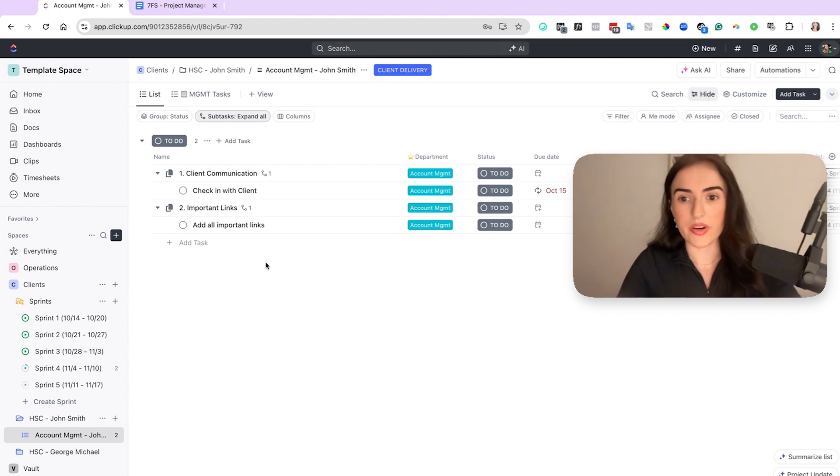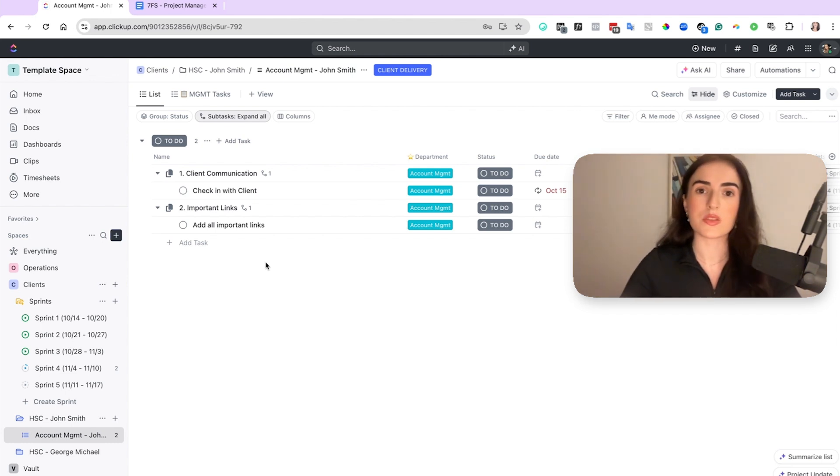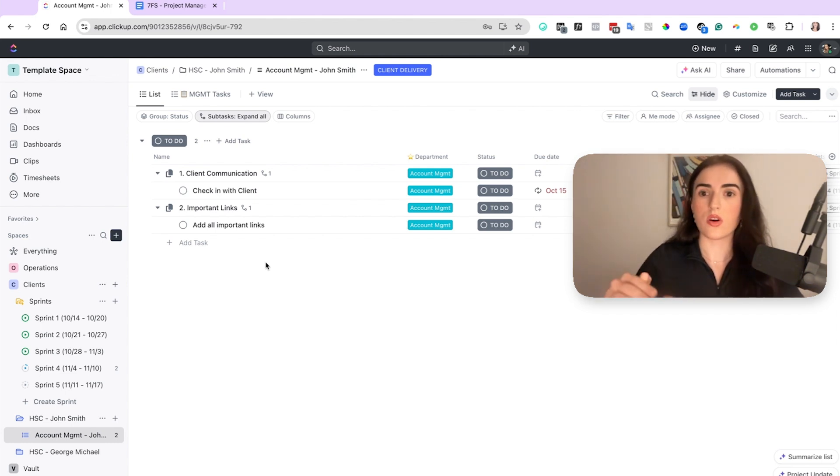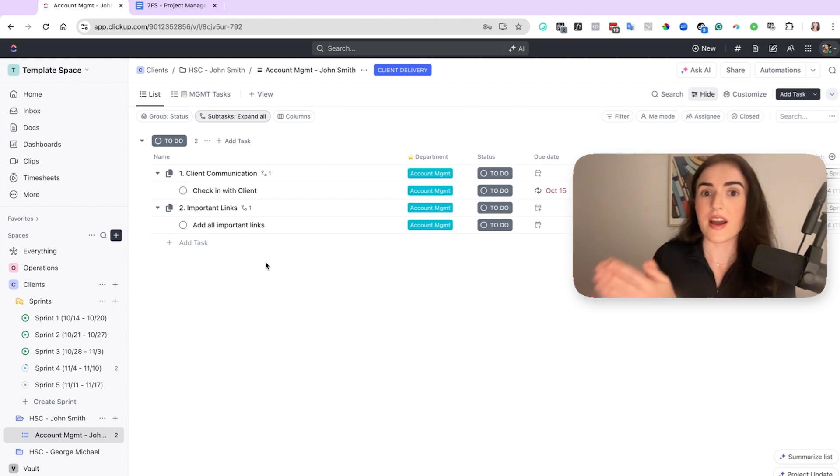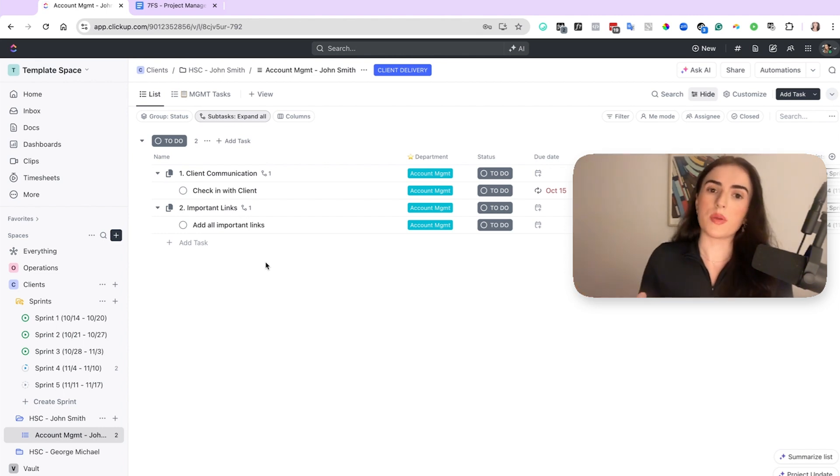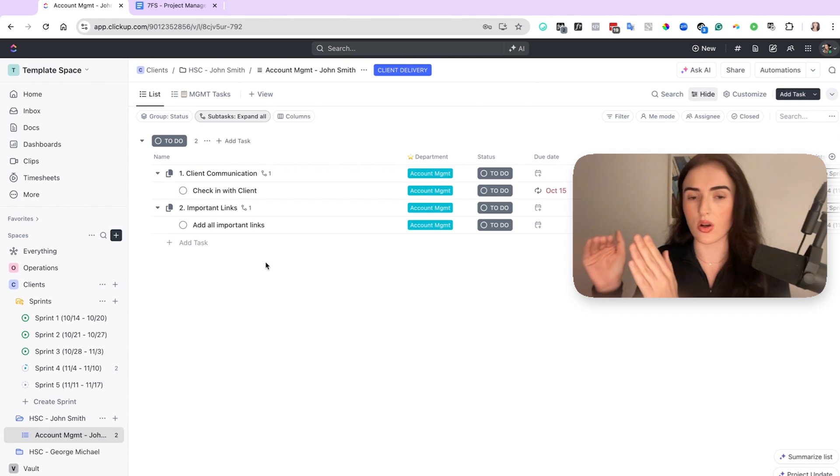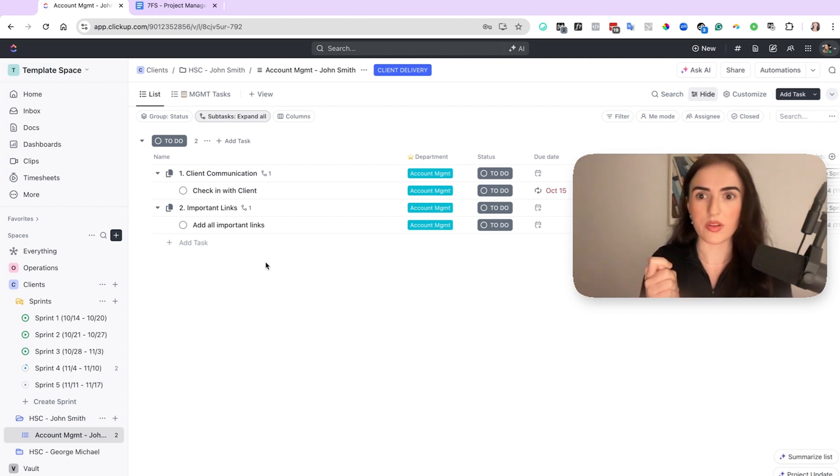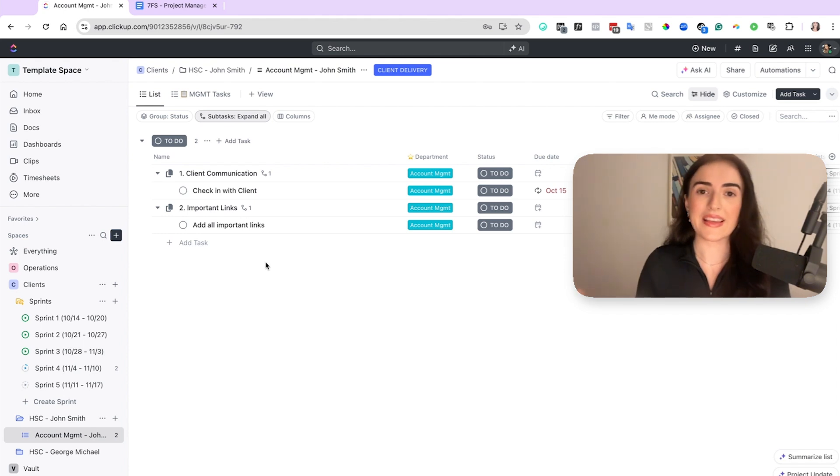But one thing you need to account for is that sprints should not always be 100%. You should expect that your team is working five hours on the predefined sprint tasks and then they have some hours, like one or two hours every single day to work on some urgent tasks or maybe a task is going to take longer. So don't try to make it a hundred percent all the tasks.